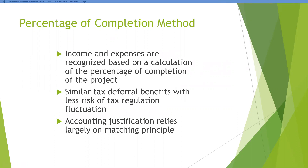In the percentage of completion method — this is what we're talking about today — we're recognizing the income and expenses based on some sort of calculation of the percentage of completion on the project. We have to have some basis for knowing how far along we are in the project, and then based on that we're going to go ahead and recognize those income and expenses. That's relying on the matching principle where we're recognizing income and expenses in the same period. And there are some tax deferral benefits with this because you're not billing the entire long-term contract all upfront.